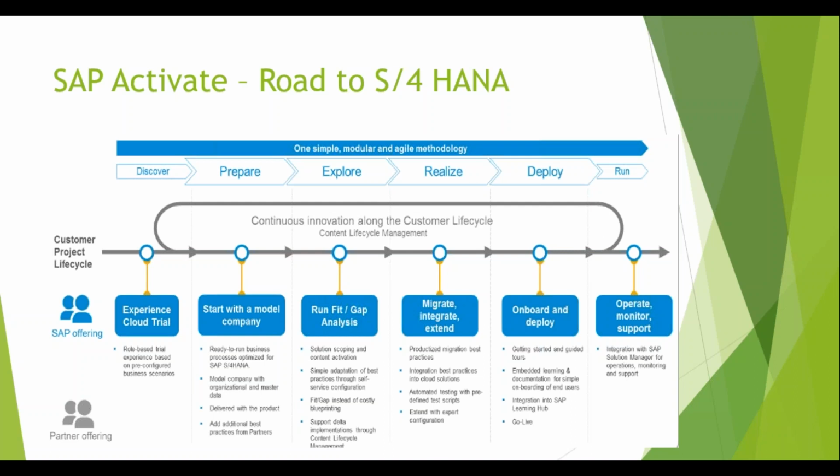Keeping that in mind, what SAP is suggesting in Activate is, instead of having theoretical discussions with your business users, show them how SAP processes will interact on day one itself. So whenever you are visiting the customer for finalizing the solution, finalizing the design, you start with workshops. And in the workshops, you don't ask them how they process this transaction and how exactly they carry out this process. Instead of that, you show them the SAP screens, the SAP S4HANA system. You show them SAP S4HANA with the end-to-end process.